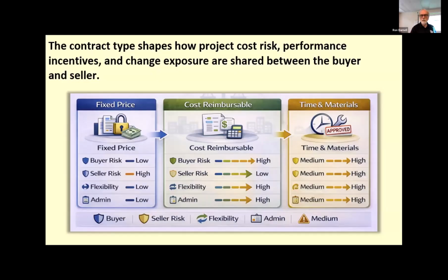All that must be negotiated and finalized carefully. So the typical flow, we haven't talked about that in here yet, but the typical flow is that we go through and we solicit the bids, we evaluate the proposals, then we award the contract. And it doesn't mean we execute the contract. Usually there's a negotiation period between the award and the actual execution of the contract, signing of the contract, to finalize details. So from a project management perspective, contract types affect much more than the procurement paperwork.